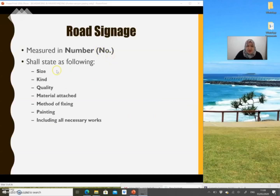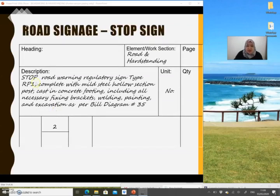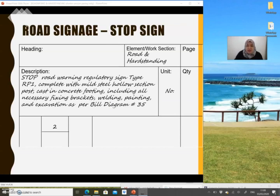Road signages are measured in numbers. You need to describe everything in one description: the size, kind, quality, material, method of fixing, painting, and all necessary work. For example, a stop sign — nature: stop road warning regulatory sign — you need to mention the type prescribed in the drawing, complete with mild steel hollow section post cast in concrete footings, including all necessary fixing brackets, welding, painting and excavation as per build diagram. When the contractor prices this item they can refer back to the build diagram attached in your BQ.